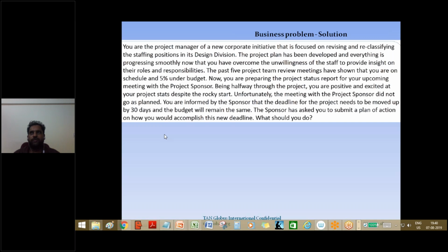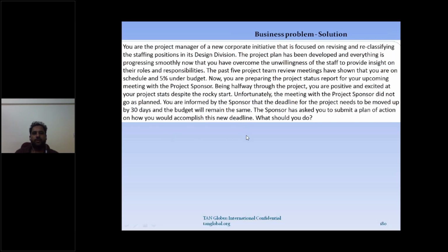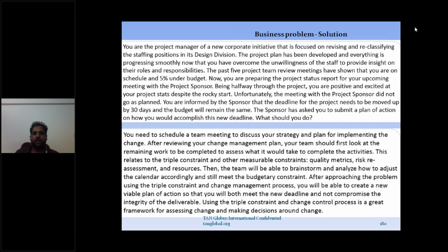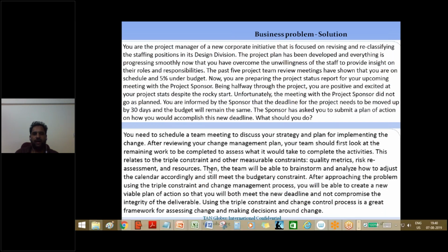So what will be the third step now? Going with the options and corresponding impact to the CCB. CCB will approve it and then take the new plan. That's it. So again, the steps are very standard. Any type of change will be going through the same process. Yeah. So now, can you read the third answer, and is it making sense?